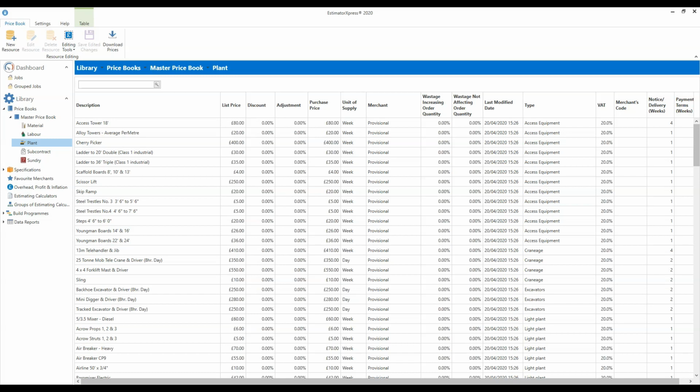But our thinking is, if you own the equipment, so if you own your digger, you still need to charge for the use of that. Otherwise, you're not covering your capital expenditure on those particular items. So in the case of a digger, you might have finance on it, so you might be paying interest on it. There is wear and tear and maintenance. There's fuel costs. There's depreciation.